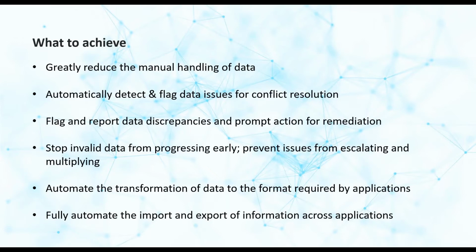We really want to stop the progression of invalid data as early as possible. For example, if we allow the early design inconsistencies to propagate throughout execution, issues related to those inconsistencies begin to multiply and eventually lead to possible delays or rework during the construction phase of the project. Digitally enabling AWP also allows us to fully automate the aggregation and transformation of data into the required output for consumption by other systems. To re-emphasize, this automation is only possible if the data requirements have been defined and are made available as the foundation for the implementation of a digitally enabled AWP framework.